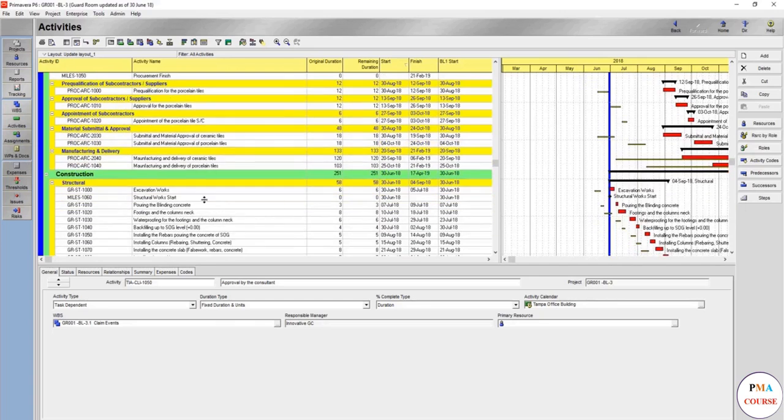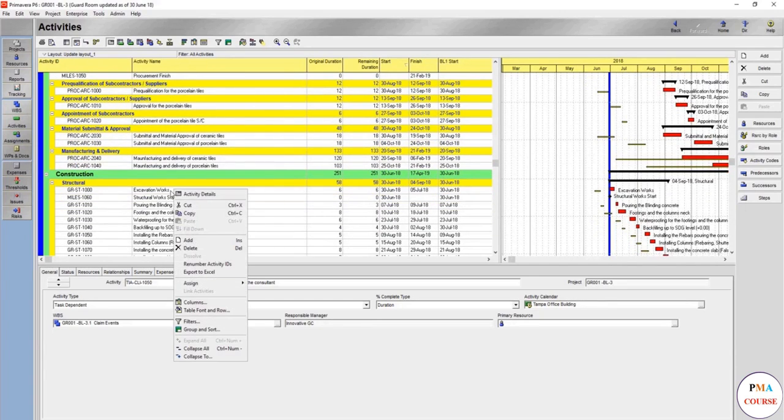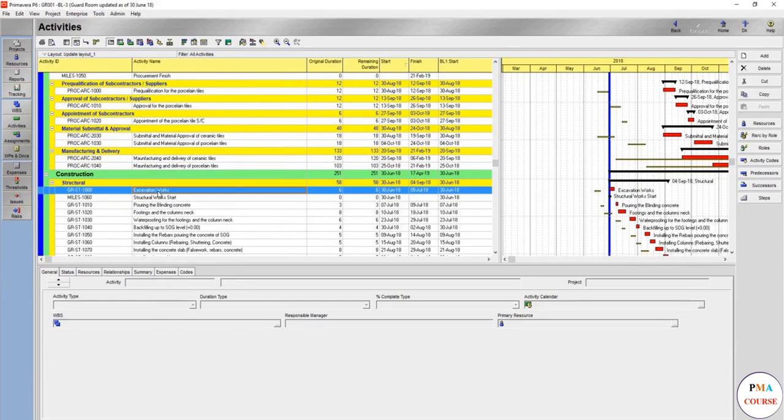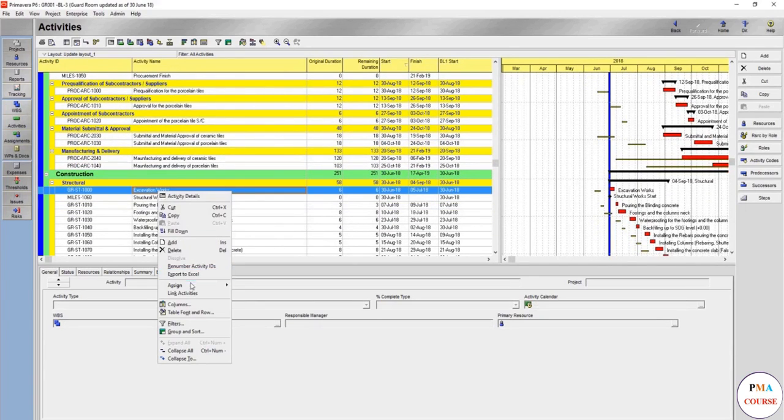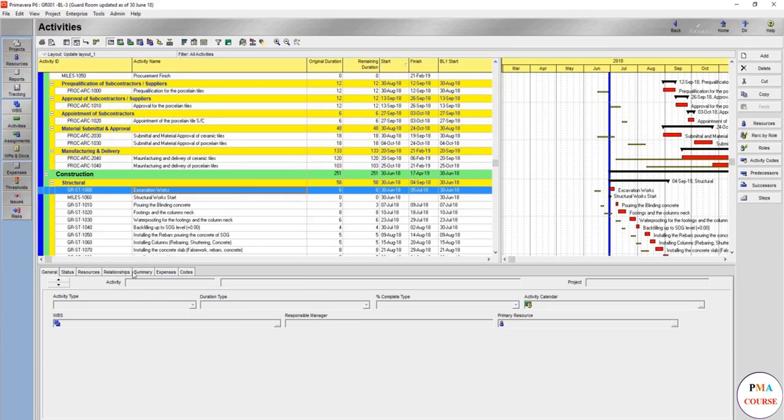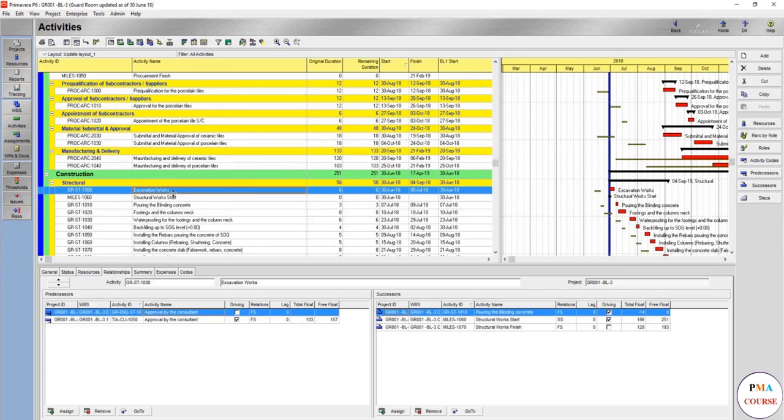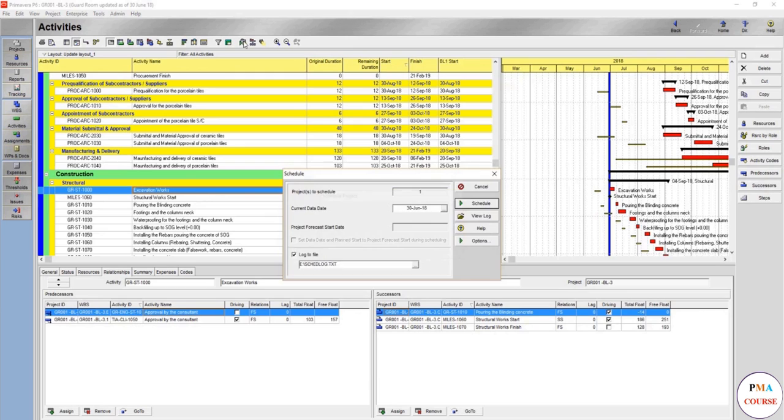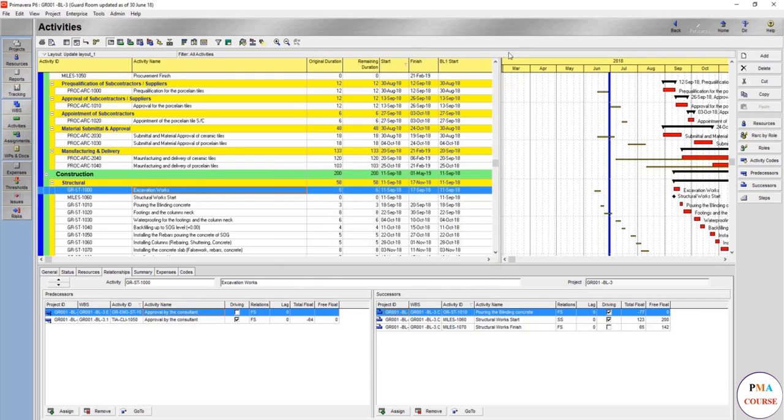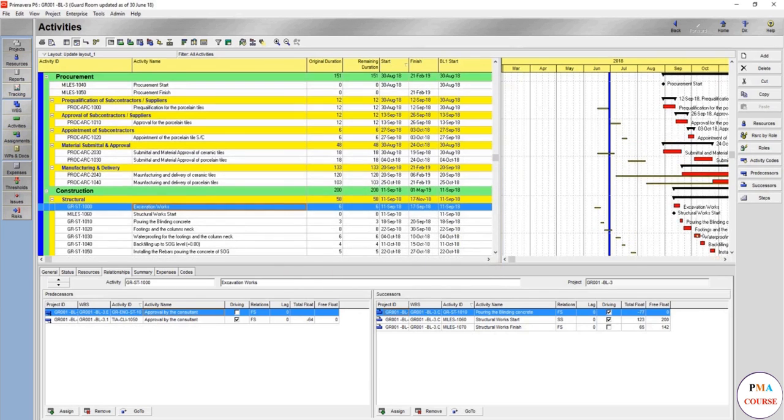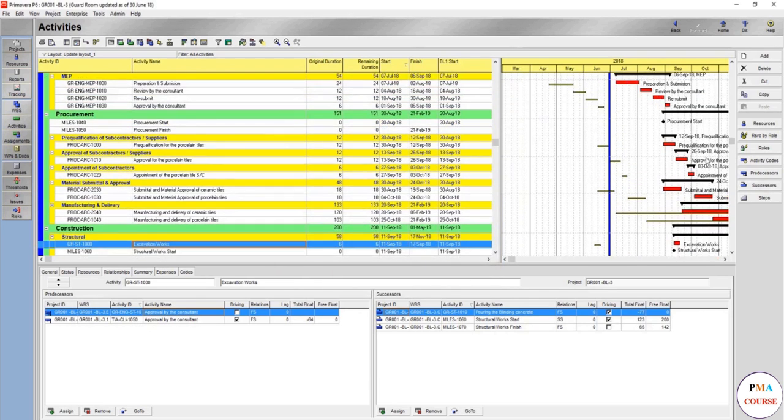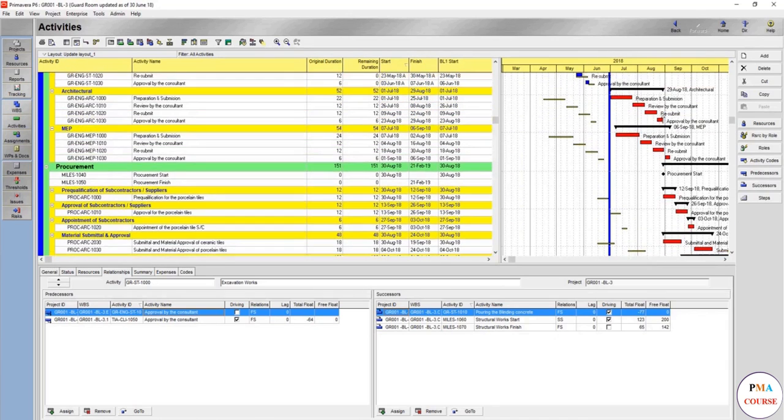We will link the approval to the excavation works. Link activity because it was already linked before. And here this is the new one. If you run, this will totally change. So this means your delay might be covered here.